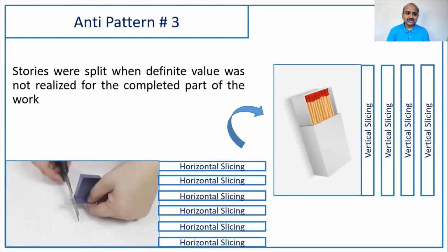But in many situations, I come across a team that builds horizontal pieces so that vertically the product owner will not be able to see anything, and then they claim story points for it, and then they split stories, and then they carry the remaining. No, it is not like this. We have to educate the team saying that, guys, the story points will be awarded only if acceptance criteria by acceptance criteria are met. If there are 6 acceptance criteria for the story, and you complete 2, then 2 by 6 means 1/3 of the total story points you can realize.